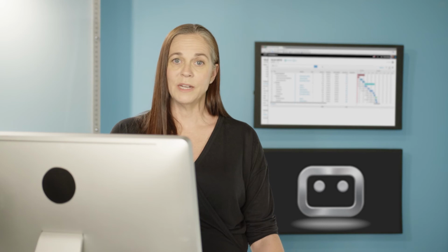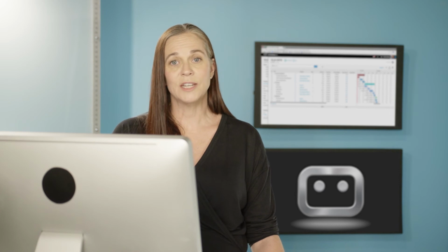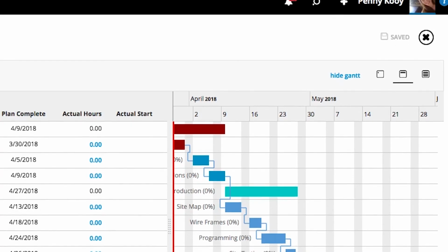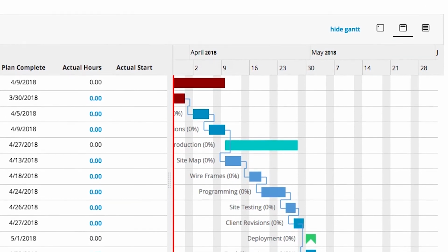Obviously, sometimes we need to work on a weekend or a holiday, but 9 times out of 10, you didn't plan to. So having Workamajig set up to follow that default will ensure that we won't accidentally plan for work to happen on days we're not planning on working.